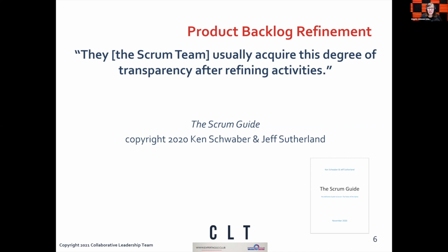I'm running into lots of prescriptive Scrum mastery out there in the world of work, where some Scrum masters right out of the gate will say, oh, well, we just need a definition of ready. We just need a definition of ready checklist to hand to the product owner. What? Why can't the developers talk to the product owner, which is kind of the whole point? And there is no such thing as definition of ready in the Scrum guide. There's a definition of done. And the way that we find out whether we agree or not is by talking to each other.